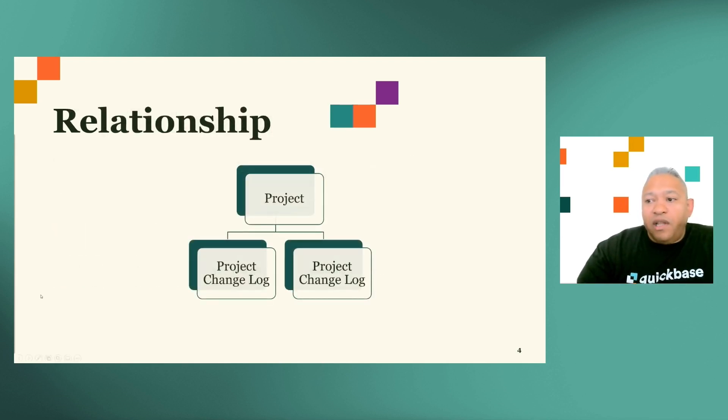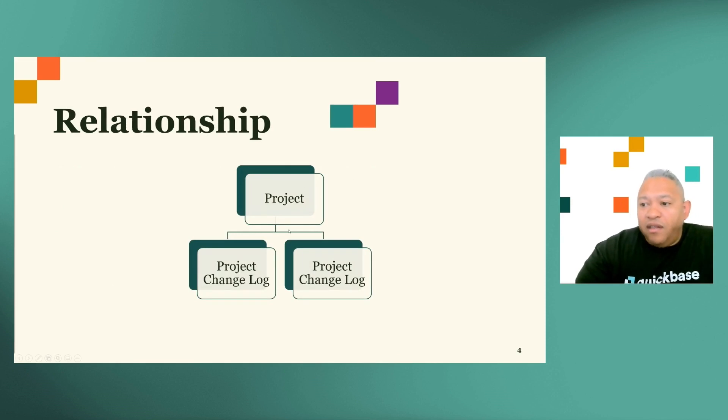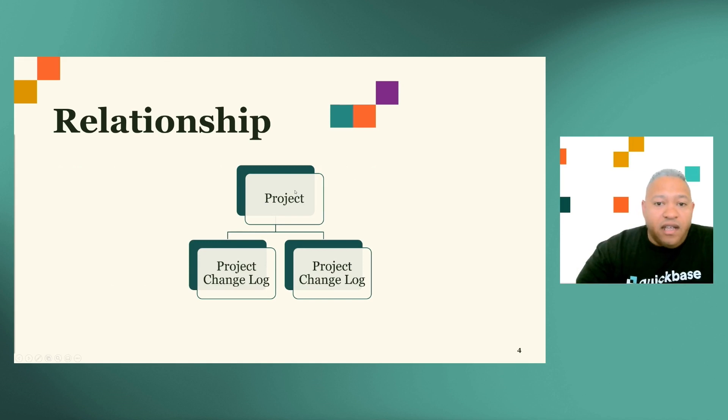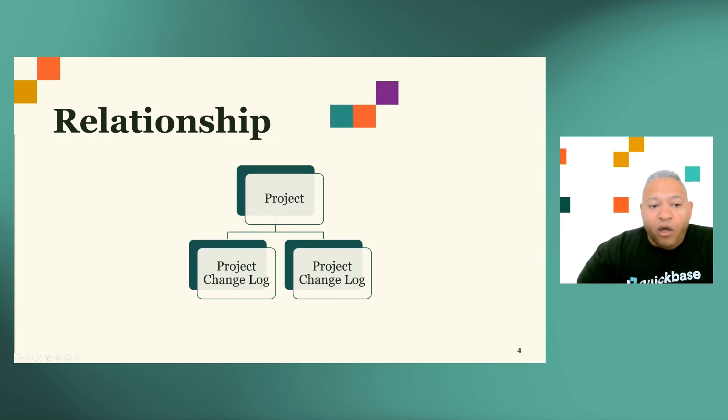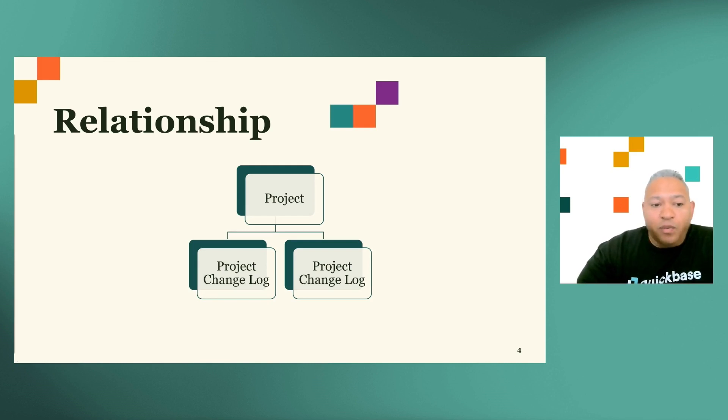Let's explain the flow. In terms of the relationship, we're going to have a parent table called project, and each one of the changes that we're going to be tracking is going to be a project change log, one project to many project change logs. In terms of the flow in Pipelines, it is a very simple two-step pipeline with a specific trigger.